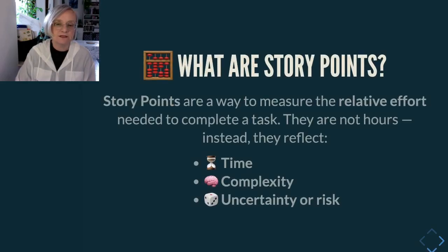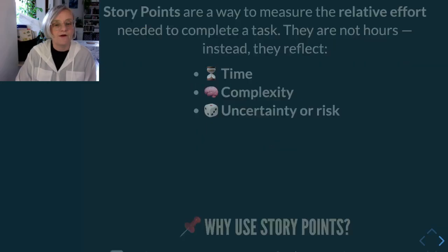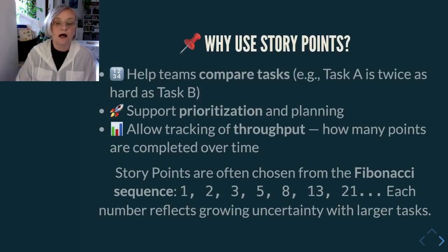Let's talk about the key concept: story points. Story points don't measure time, they measure effort. We ask how big and hard is this task. We usually use the Fibonacci scale. It helps to compare tasks, prioritize, and track progress.